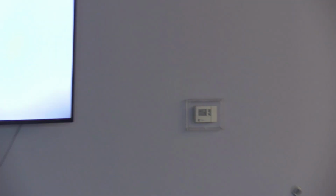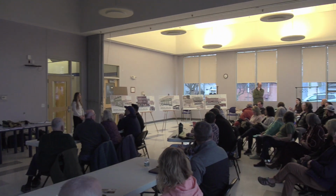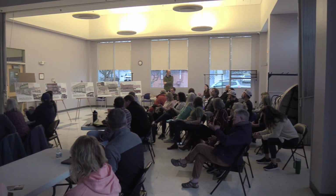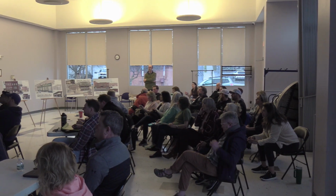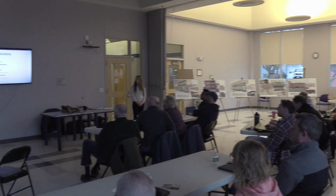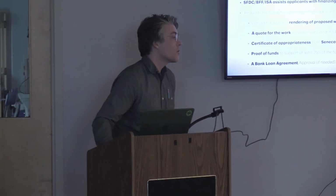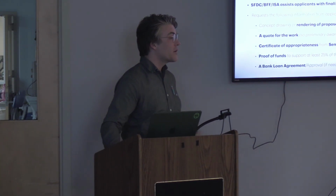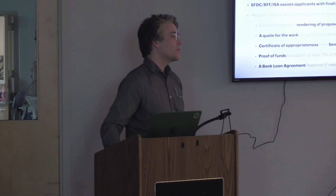So if you have to show proof of financing for that 25%, how do we estimate it if we haven't gotten the bids yet? Yeah, so that would be part of the assistance we could provide. Either you could call and just get a quick quote preemptively, or we could help you with a quick order of magnitude to give you a rough idea of what it will be before we go to bid. So there's a couple ways we could figure that out, but I have confidence we can.